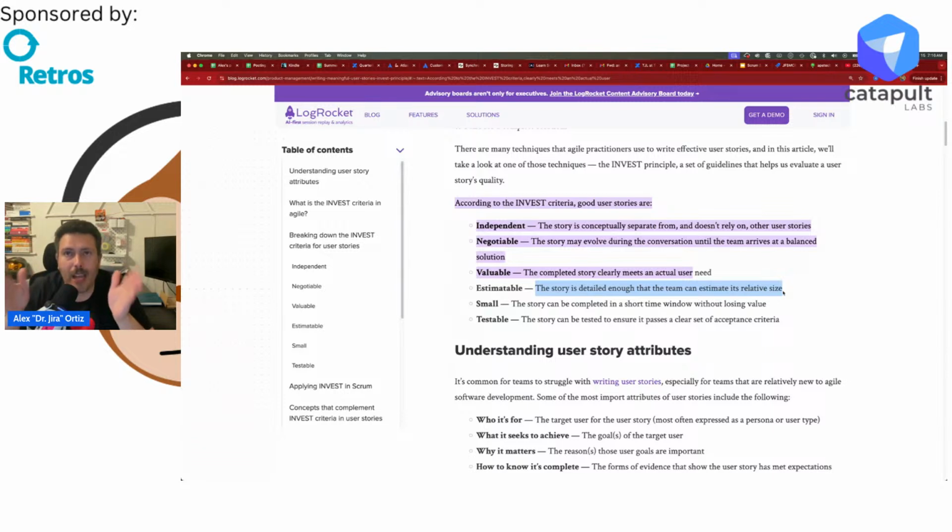And so when it comes time to estimating, a big mistake that I see a lot of teams make is that they'll take a story that's already big to begin with, and then there are 3 or 4 different people that need to contribute to that story. Because the story is so big, and there are so many more moving parts, we can't complete our stories within the bounds and constraints of the sprint. And this is where we have a lot of bleed and carryover from one sprint to the other. But it's because, again, we're not following these rules of INVEST, which is why I wanted to start off with INVEST first, to get you into that mentality.